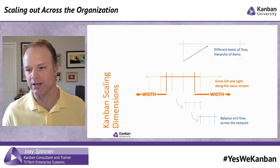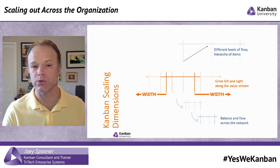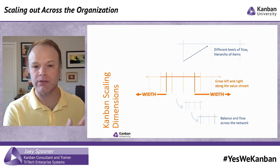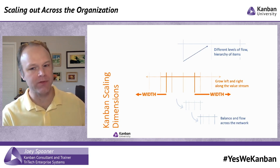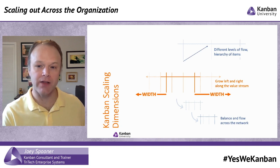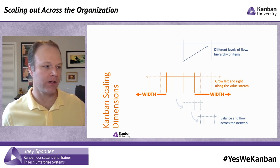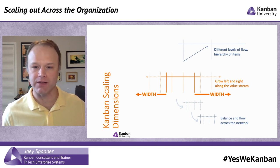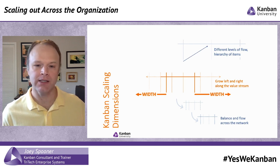Because the result of not having good requirements, not having a good cadence for requirements, even led to them struggling — they went through a starving and then a feasting kind of model inside their Kanban system. That taught them right there: we don't want this kind of variability in our system. What we want is a good, smooth, reasonably flowing amount of demand. So let's go upstream, let's get this stuff organized. Now they're building out their value stream, touching on their customer representative, trying to figure out what they need in a more effective pattern of management.